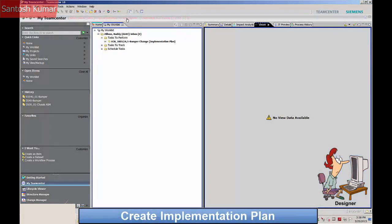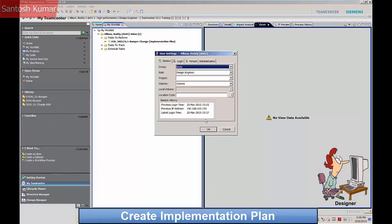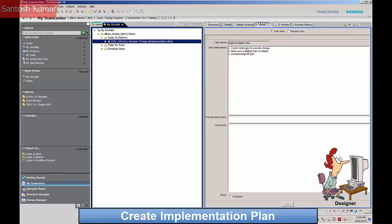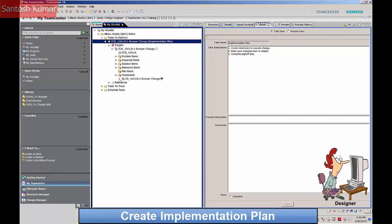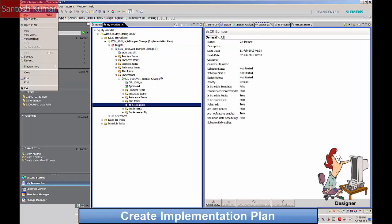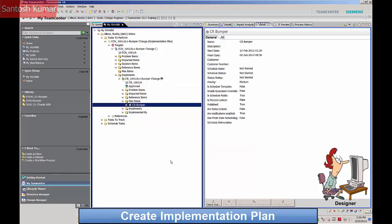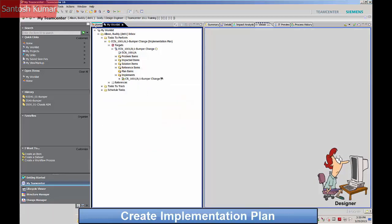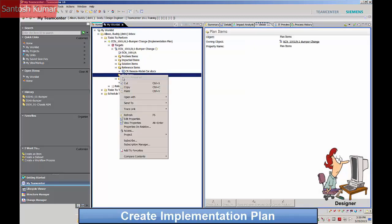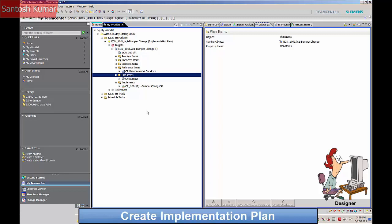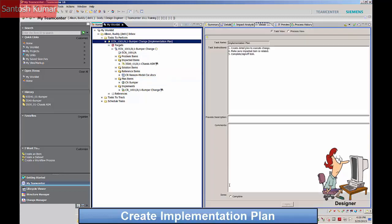The designer now receives a task to create an implementation plan to cover the change notice. The new change notice plan schedule is created by copying the schedule created for the change request process. The implementation plan task has now been completed and is signed off.